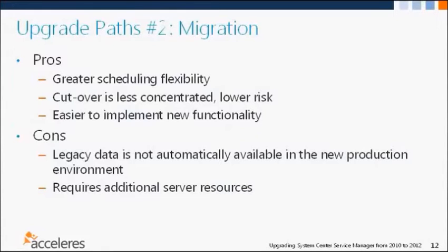The cons then are essentially this. Legacy data is not automatically available. All of your historical data that's been groomed out of the console and is only in the data warehouse, that's not going to automatically be available. Like we said, it is possible to migrate that data into Service Manager 2012 into your new environment. It's not a trivial process to do that. It's a significant amount of work and planning and effort and requires some lead time and testing. But it is possible to get, I'd say, the majority of your legacy data from your old system into your new system, but it isn't 100% foolproof. So that is one of the cons.